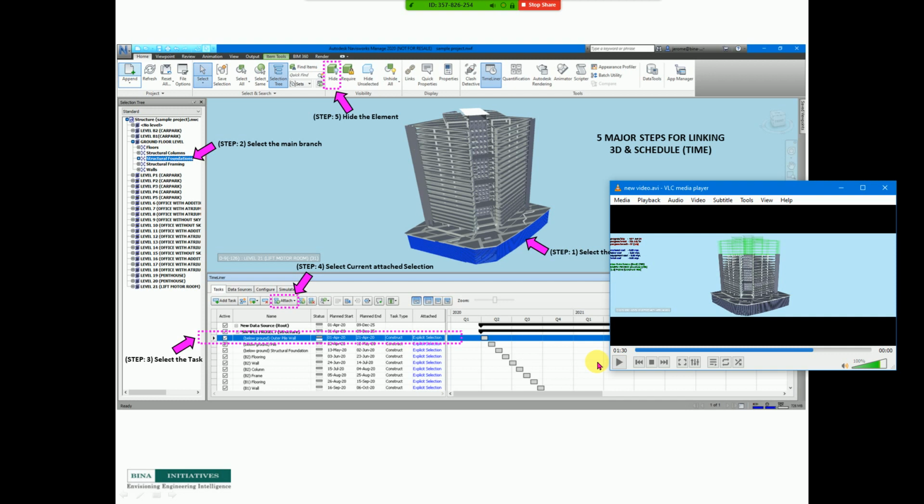So there should be coordination from both parties. The reason I'm saying this is that in my previous projects, when synchronizing the program and the model, some activities from the program we just had to leave, because they cannot be found in the 3D model.